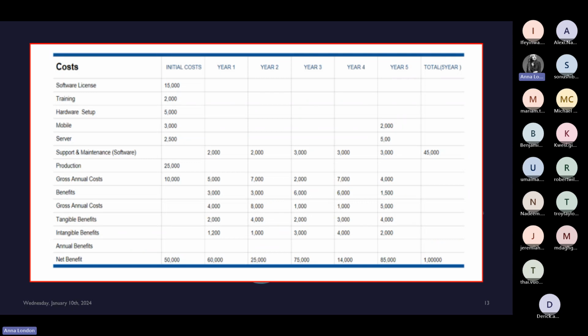Times however many people, okay? Your human capital equals however much potential cost savings, because you could factor in their salary. If you have access, many times it's contracts or whatever, salary, and you do a per hour metric. And that is a really good number to use. When you're looking at it from that, you always take it to the man hours.